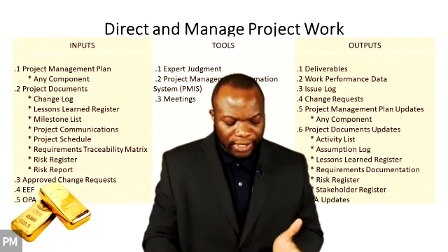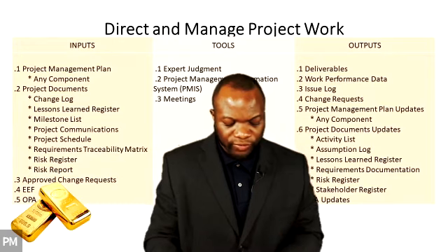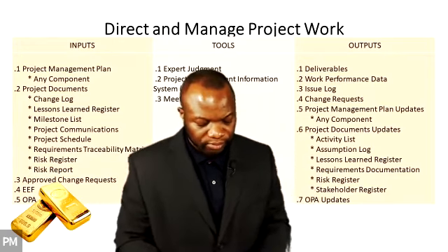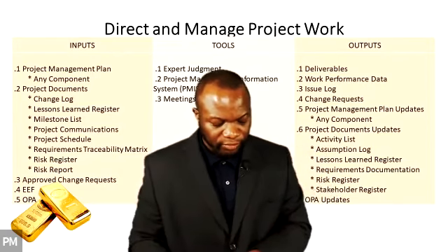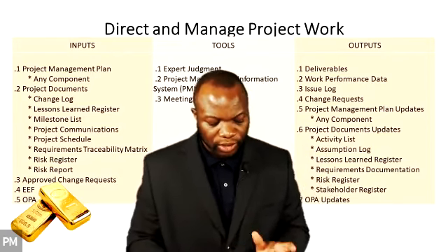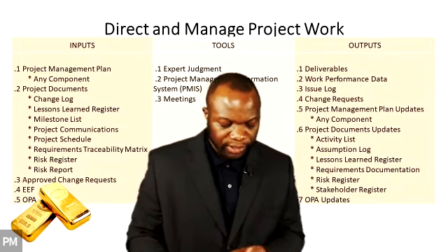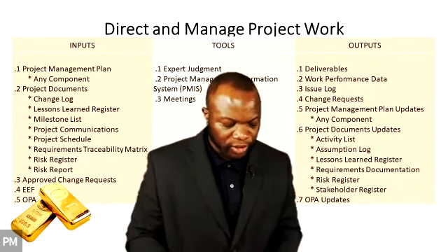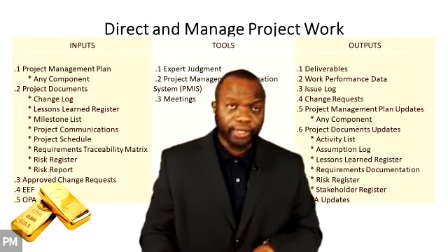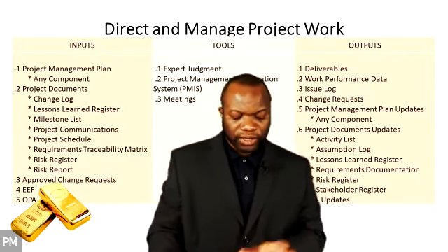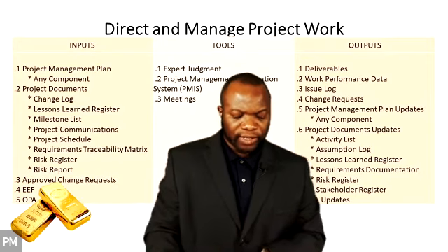It then says change control should be applied once the first version of a deliverable has been completed. The control of the multiple versions or additions of a deliverable, that is documents, software, building blocks, is supported by configuration management tools and procedures. So that's a big one. Understanding what deliverables are. That's the beginning.